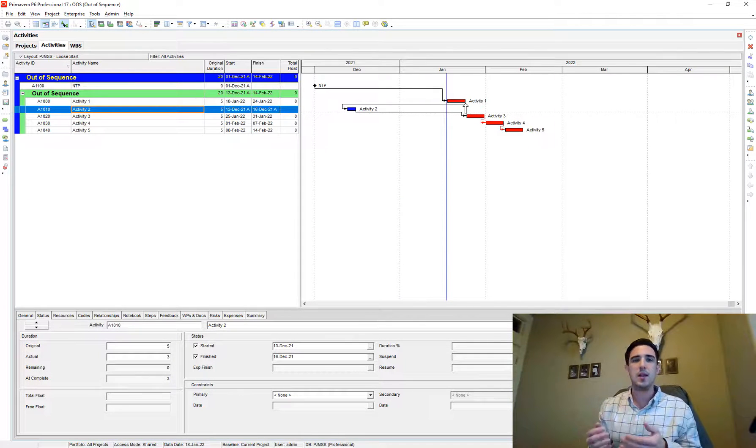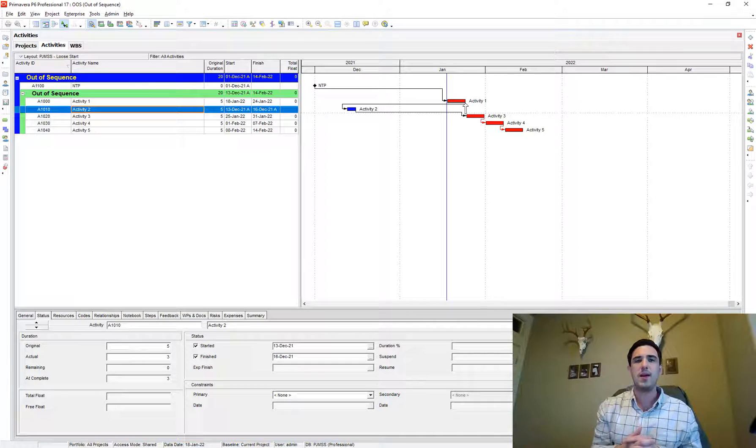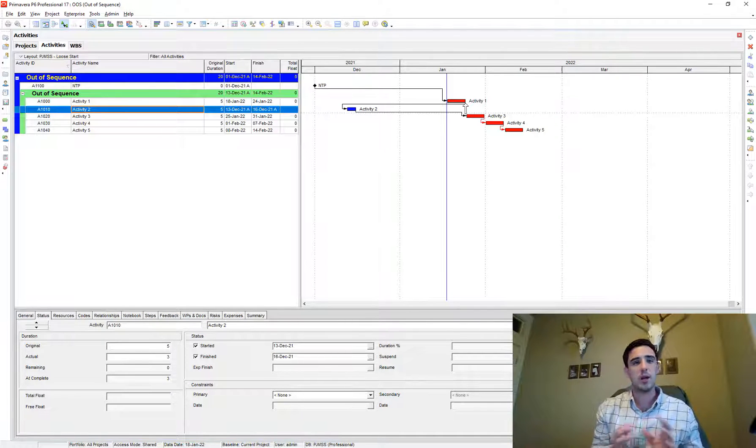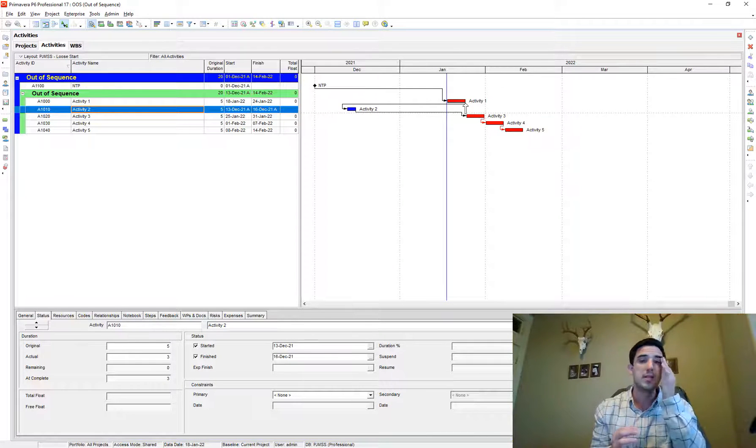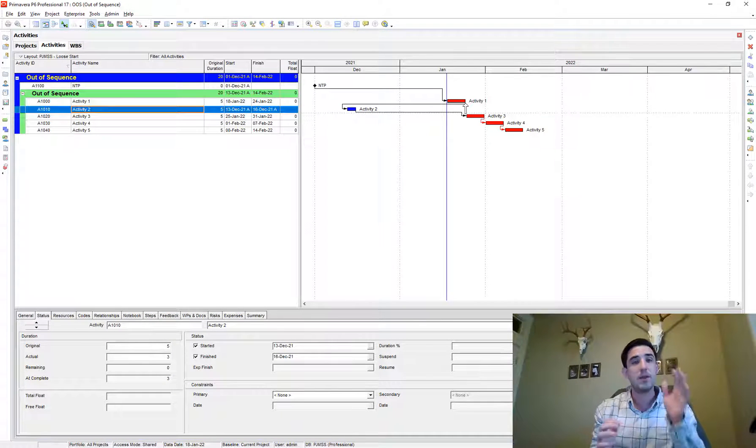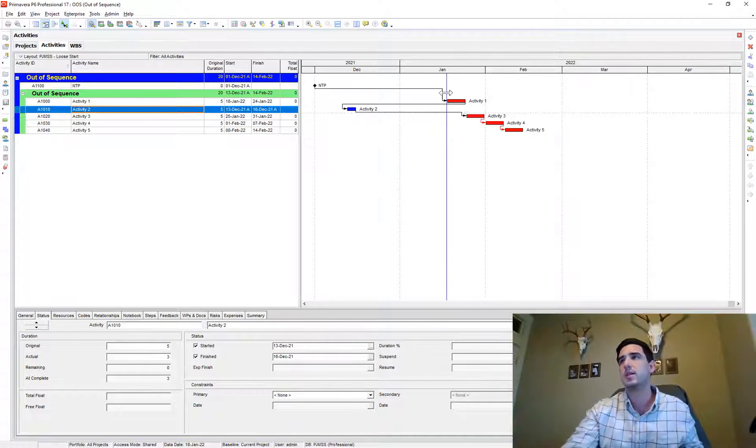And so therefore activity three cannot start until after activity one finishes. So that's retained logic. It's going to retain the logic that you have in the schedule regardless of out of sequence progress.